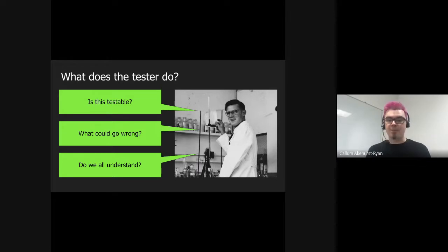Because that's not testable. If somebody comes along and says, this is performant, what does that mean? Performant is a very loose terminology. So we want to say something more akin to, this should respond within this many seconds, because we can actually pass or fail that. So we need to be questioning, is it testable? We can question anything that's open to interpretation. I like to say you don't want me as a tester to define what good looks like, because I will go to the nth degree and test out everything. That's a good way to get your product owner thinking about these things.